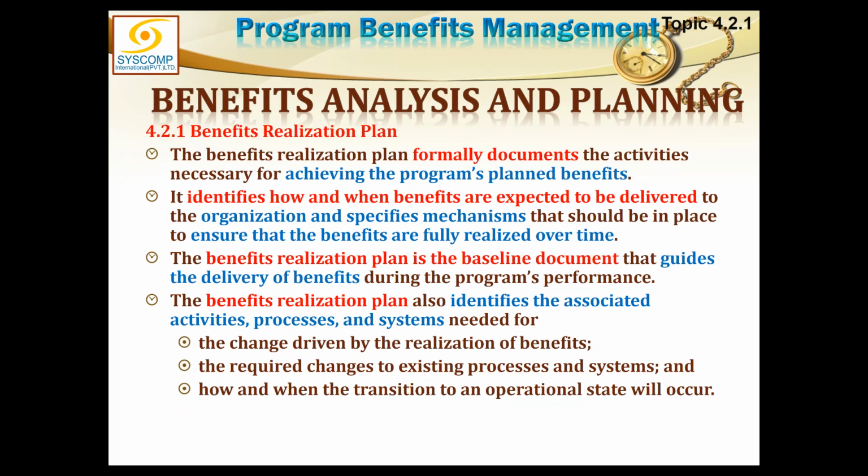The realization plan also identifies the associated activities, processes and systems needed for change driven by the realization of benefits. If there is a change, how it is to be managed, the required changes to existing processes and systems, how they will get inducted into the program through the change control process, and how and when the transition to an operational state will occur.